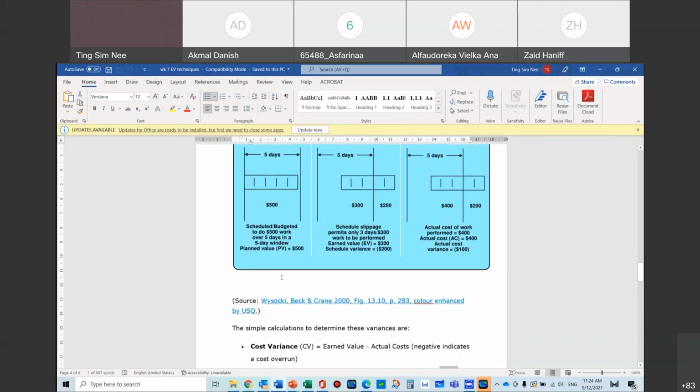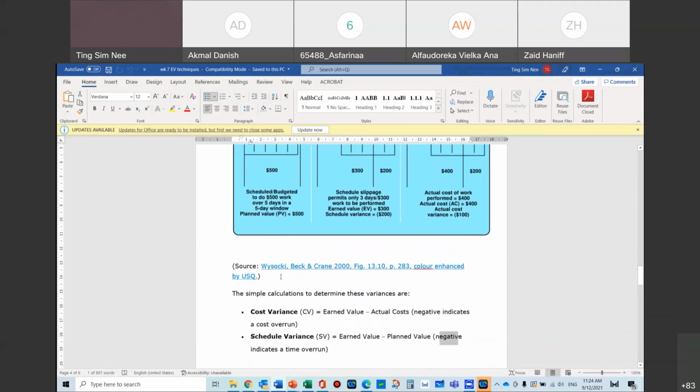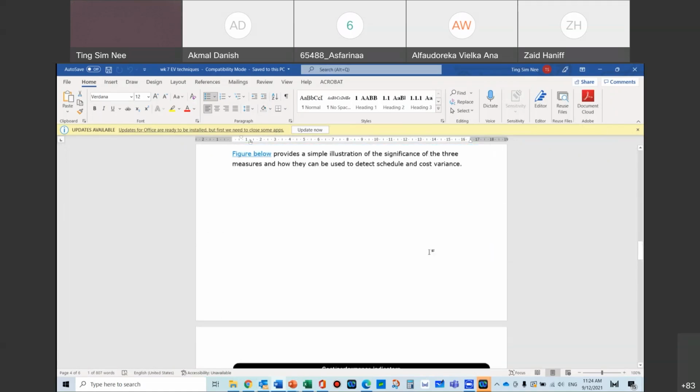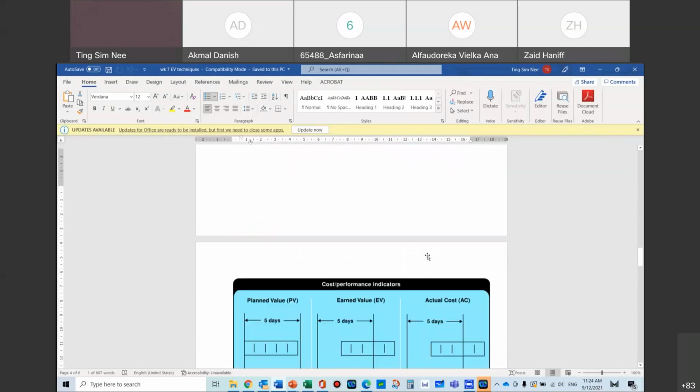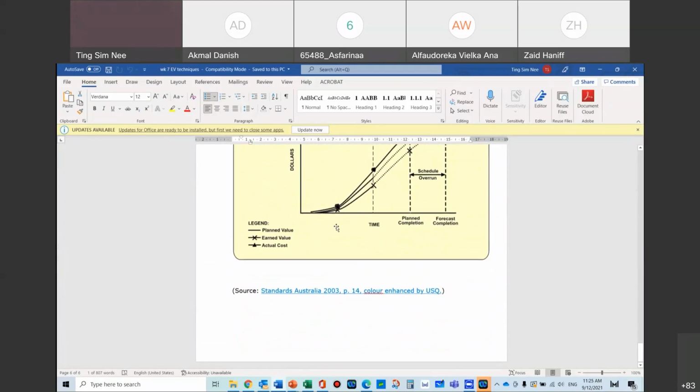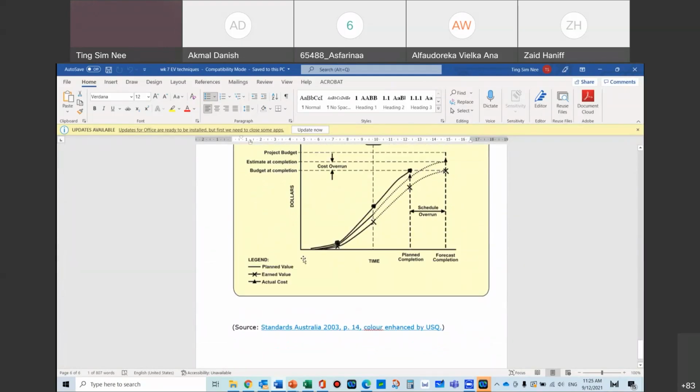You see, it's a very powerful tool. Straight away, you can detect from the original S-curve. So the original S-curve, you don't touch already. You've already drawn it. So the original one is PV. This line is PV. So this is what you've already planned. This is PV. This is the S-curve that I taught you how to draw just now.